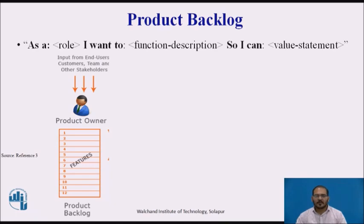The main source of information about the project is the project backlog, which defines the requirements the application must meet in order to be successful. Requirements are expressed as user stories — short statements identifying the type of person, the functionality they need to perform in their own terms, and the value they expect to achieve. These are intentionally expressed in very personal terms and kept to what would fit on an index card. Keeping the story short ensures the requirements are fine-grained.